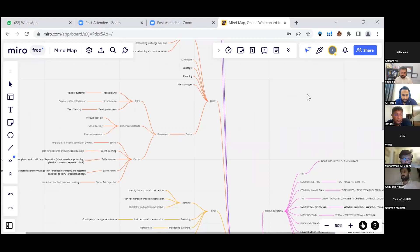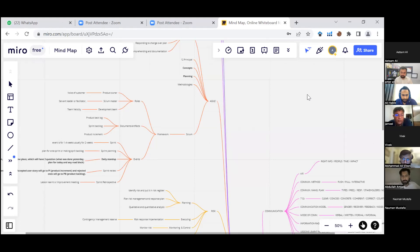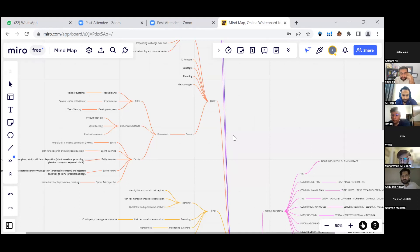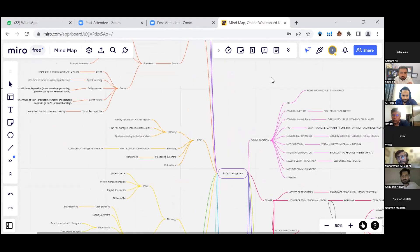We have different sprint events. First we define the sprint — typically one to four weeks, usually two weeks. Then we plan the sprint to determine the sprint backlog. Daily standups ask three questions: what did you do yesterday, what will you do today, and are there any impediments? At the end, there is a sprint review with customers and the product owner for feedback. Accepted stories become deliverables; rejected ones go back to the product backlog. Then we have the sprint retrospective where lessons learned are discussed.